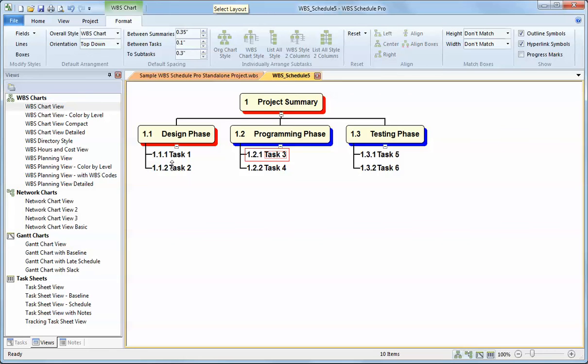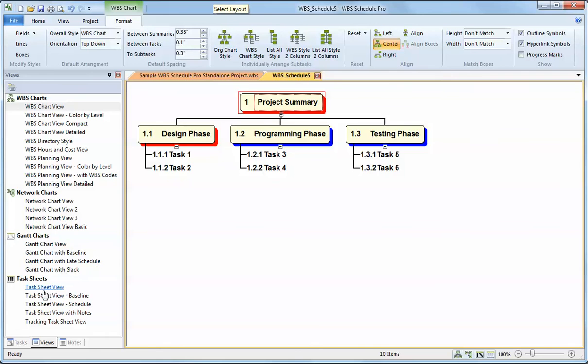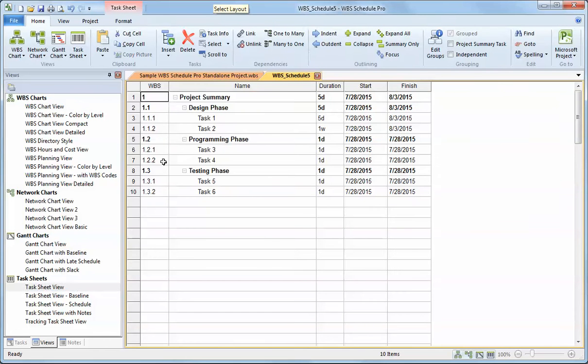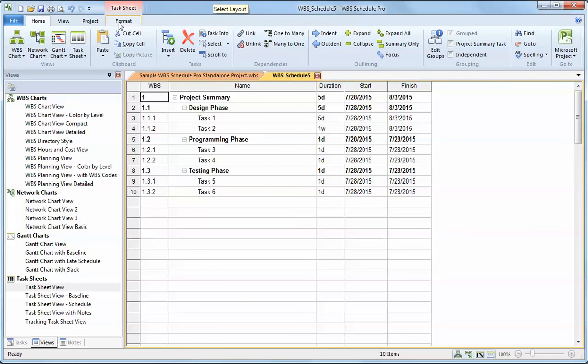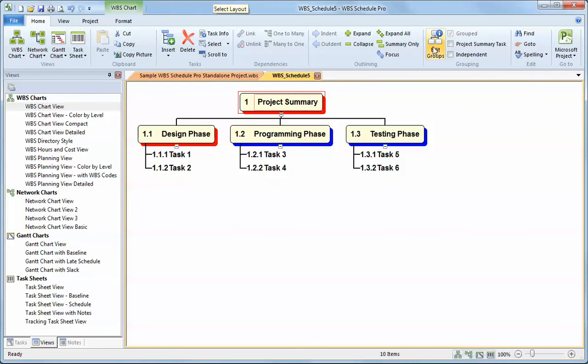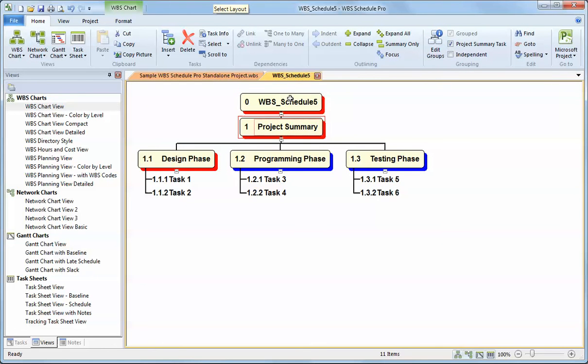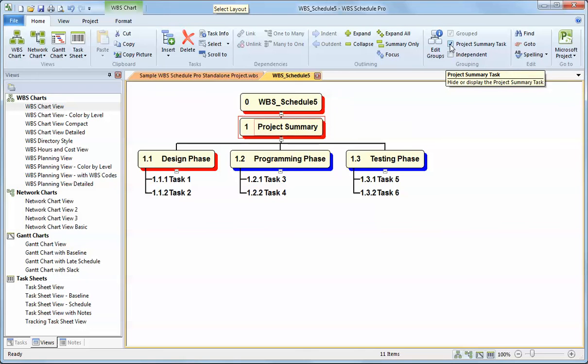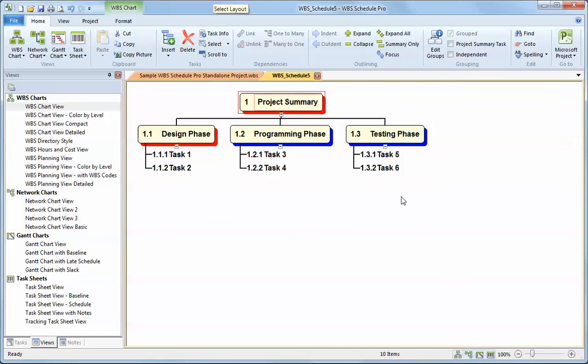I can repeat that process for the tasks by choosing fields, tasks. I can add a column to the left. I can click on the left field and choose WBS from the drop-down list. Remove the grid. Click OK. And now I'm showing the WBS field for both summaries and tasks in the chart. A little bit about WBS coding. By default, it will code the WBS chart automatically based on your outline levels, based on your summary tasks and the tasks that you've listed. If I look at this in a task sheet, you can see that the outline level is basically your indented list. And the coding structure follows that indented list, starting with 1 at the very top. You have the option to show the project summary task.